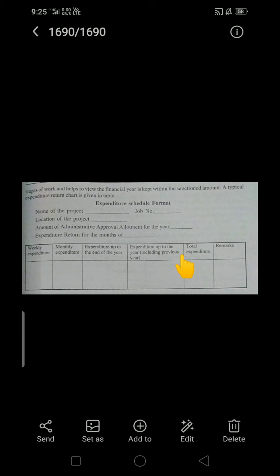So this is all about scheduling. Scheduling is nothing but the mechanical process which decides the starting and finishing date, or you can say time, of a particular activity. An activity, as I have said, is nothing but a task which consumes resources, maybe in terms of material or manpower. Then there are a few schedules: construction schedule, material schedule, labor schedule, expenditure schedule and equipment schedule.